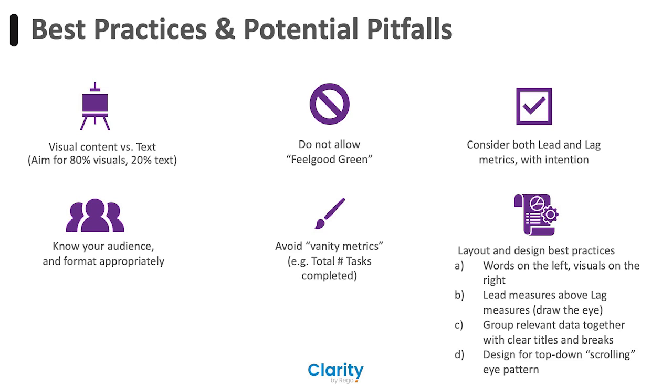Lead or lag metrics both have their own type of value, but they are distinctly different. Lag metrics, that is stating something that's happened previously in the past, are often, not always, but often merely informative because it's something that's already happened and typically we can't really change or influence that. For example, how much of our budget have we already spent? It's information and it's not just data, but we can't really act upon that.